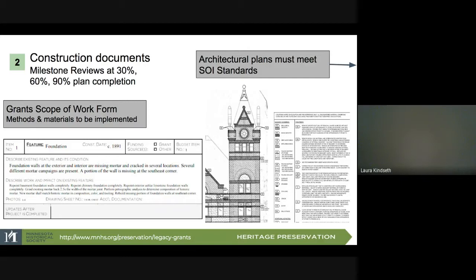So this also is a good time to mention to your architect, if you're planning on moving on to a construction grant, that you will need a photo key plan to submit with your next application. The guidelines for that can be found at Appendix H of the Grants Manual. And also note here that grant-funded construction drawings should also display the legacy logo and acknowledgement.